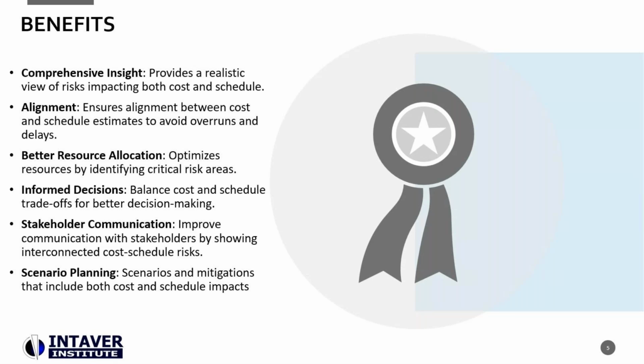So if you can bring the cost estimators and your schedulers together at an earlier point in the project and combine their estimates into a holistic view and analysis, that will improve the communication across your teams, and it will give your team a better understanding of the problems, risks, threats, and opportunities that your project can take as part of your planning process. And again, scenario planning, that we mentioned earlier.